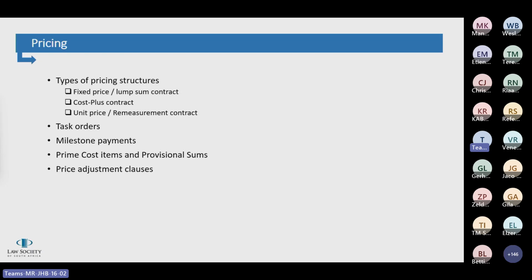They are generally a high risk for employers, and for the employer, the uncapped nature of the cost plus arrangement opens it up to open-ended construction costs. The cost plus contracts are often heavily negotiated in order to accurately and thoroughly determine the risk and cost allocations to the contractor and the employer.